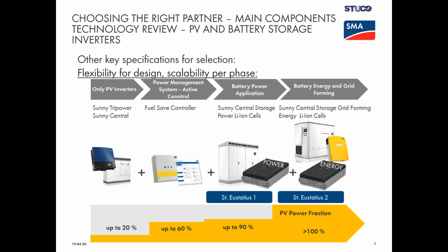Stuco firmly required that the net energy over 1 year that is exported to the grid of Stuco should be 3.2 gigawatt hours. And in phase 2, this was a similar requirement. And additionally, in phase 2, we required to get a bigger bang and speak more towards the resilience and the effectiveness of going green.